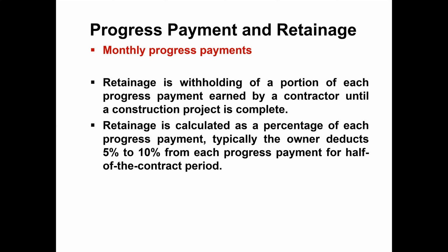Otherwise, the owner has this retainage money and can do the repair from it. But usually they release the retainage, and the contractor has to do those defective repairs and hand over the project in good shape. The remaining payments are made in full.